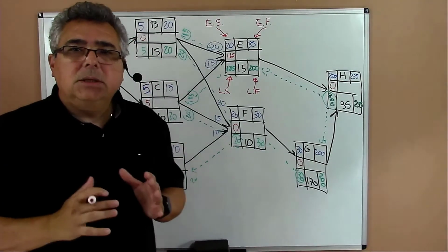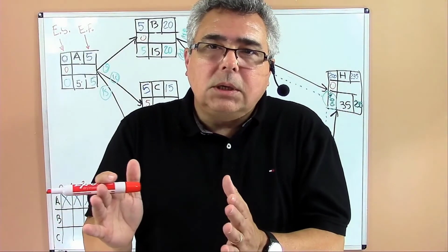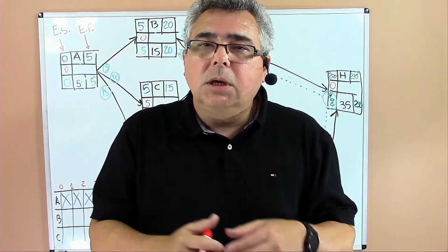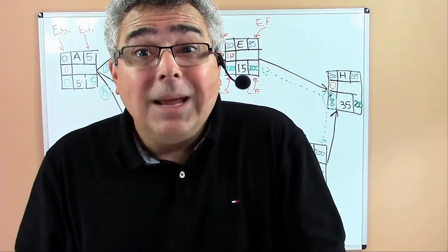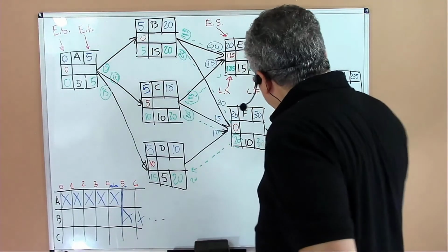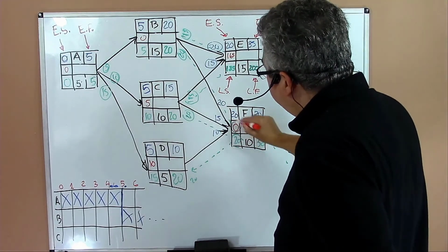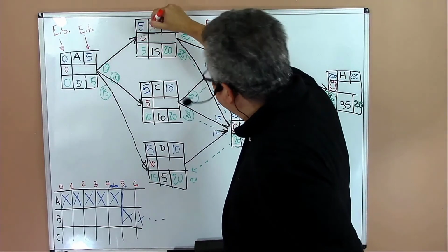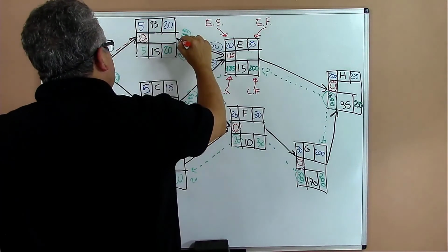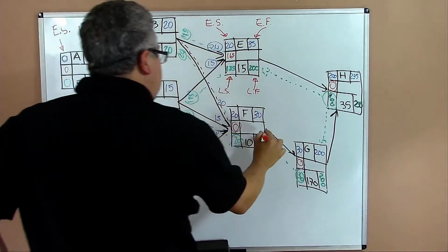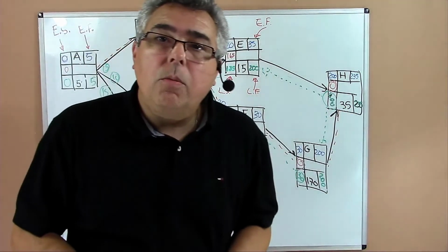So we have some activities that have no flexibility, no room for delay, no room to schedule the activity start or finish. Those activities we call critical activities. And those activities are in the critical path. So we have some critical activities: H, G, F, then we go for B and A. So if you put a line here, we can trace the critical path in the network.